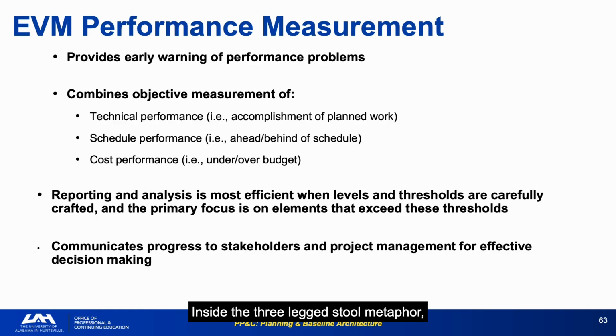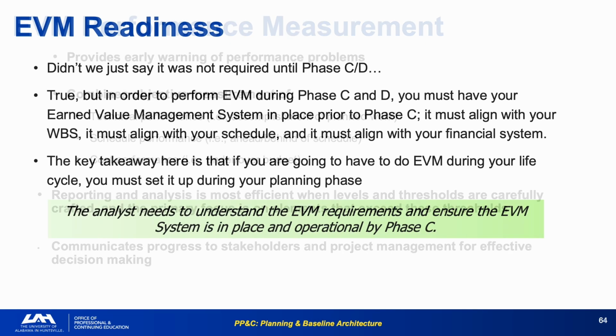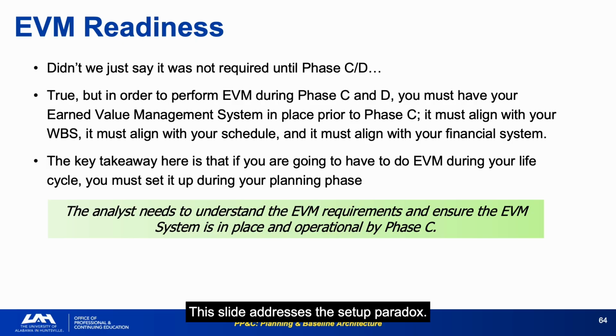The three-legged stool metaphor: technical, schedule, and cost performance each support the overall project assessment. Measure only 2, and you have an unstable picture. EVM integrates all 3. This slide addresses the setup paradox. EVM reporting doesn't start until Phase C, but the EVM system must be established during planning. You cannot retrofit compliant EVM infrastructure onto an improperly structured baseline.